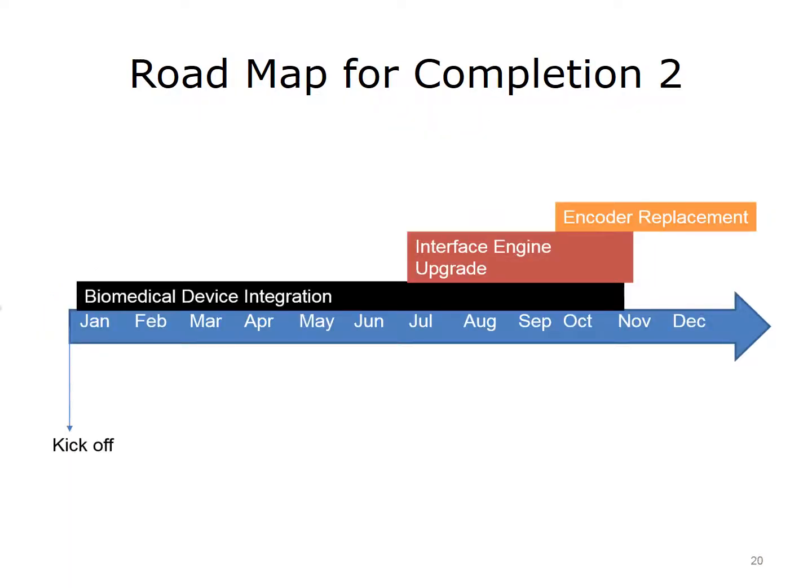In the previous slide, we looked at the activities across several months for one project. When a strategic plan is created, it often has several, if not dozens, of individual projects that must be carefully coordinated and tracked, so that projects are not competing for the same resources. In this example, we see the 3 sample projects spaced out on a timeline moving forward. It is important for the organization to see the dependencies between the projects and for executives to ensure that obstacles which could prevent projects from starting on time are removed.